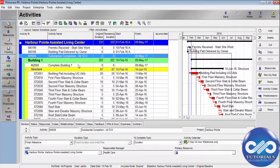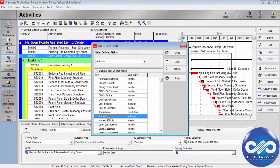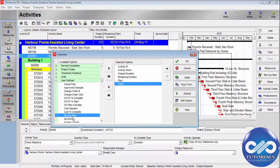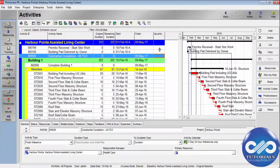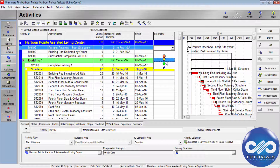To define indicators, go to the Enterprise menu, click User-Defined Fields. I have already created a field named 'DP Priority' with the data type set to Indicator. Once you create the indicator UDF, you can assign indicator values. Select the columns and add DP Priority to the visible columns, then apply. You can then click on any activity and select from the dropdown menu.